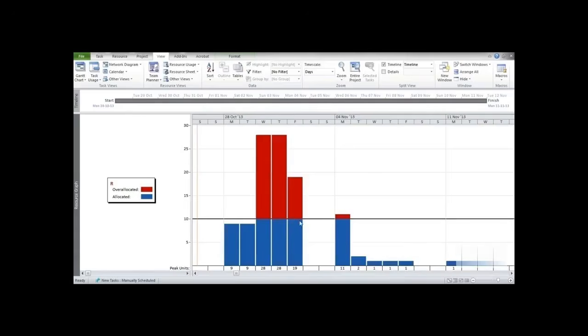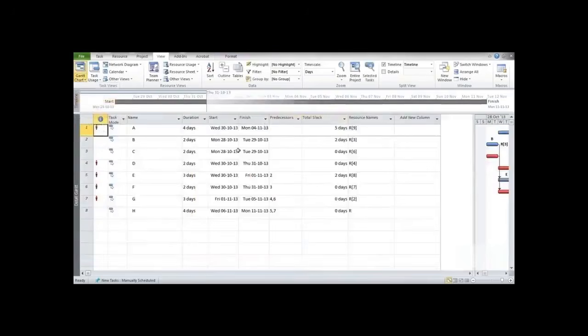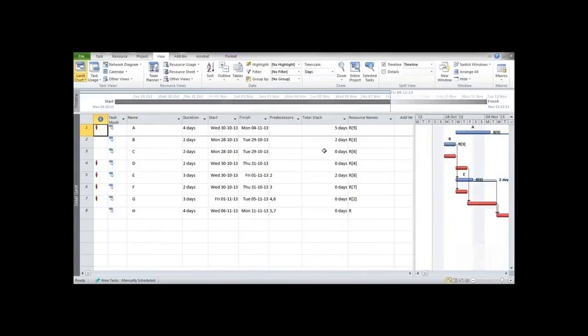So let's see how we can do it. So let's get back to detail Gantt chart over here. Now you can see that we have slack available for some of these days for A, B and E. So delaying the prior activity would not affect the overall project cycle or project time. So the one way to settle this issue is by using the slack.